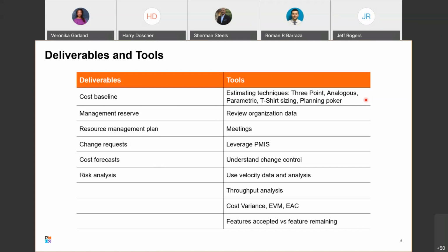If you've got a brand new team that's never done any of this work, it's probably going to take a little bit longer than a team that's been doing things such as this for several years and has stayed intact. So you have to be aware of that when doing the estimates.